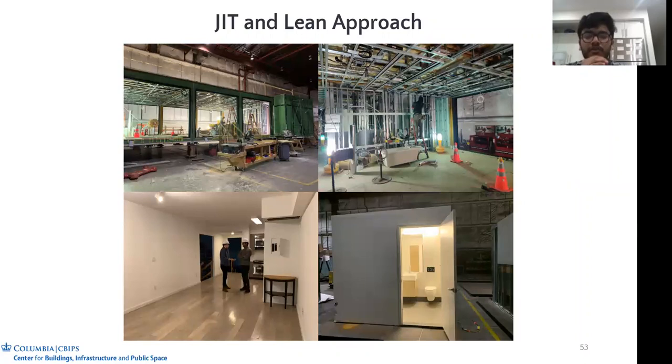So these are a few photos of the modules that were being constructed at that time. The photo on the top left corner is of a module 60 feet long, 14 feet wide, and 14 feet high. When it comes to transporting this module off the work site, they transport it at night from 12 to 6 a.m. so that they don't face a lot of traffic, which helps them in optimizing the logistics part of the challenge.